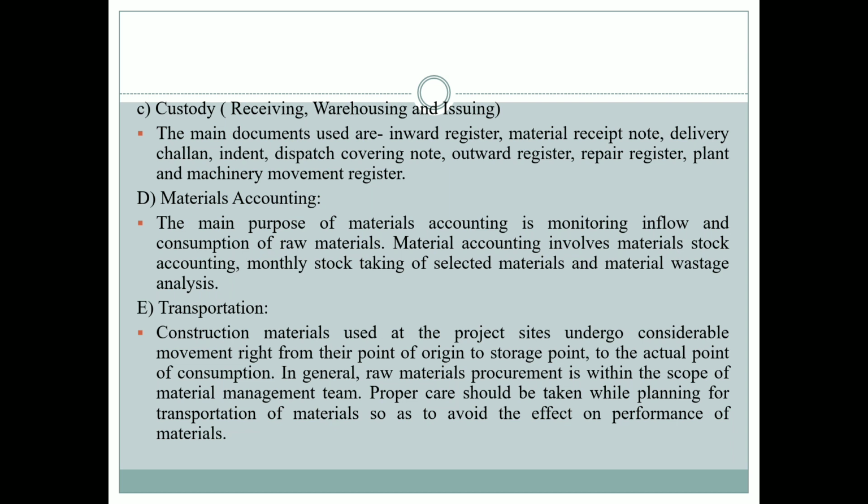Next function is materials accounting. The main purpose of material accounting is monitoring inflow and consumption of raw materials. So how much quantity of material is there in the stock, and how much quantity of material is just supplied to the site. That is nothing but the material accounting. Material accounting involves material stock accounting, monthly stock tracking of selected materials, and material wastage analysis.